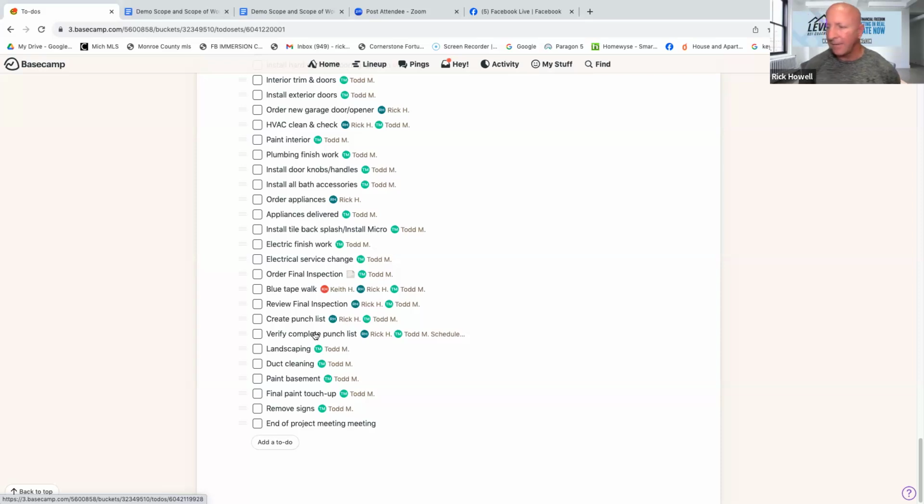Right about that time, in our market, we do our landscaping last. So we do the exterior of everything, but we don't put down the mulch or final cut on the beds or any of that stuff until just before pictures are getting ready to come, because that's when you want it to be sharp. You don't want any overgrowth or anything like that. We do our landscaping right before pictures come. That way it's fresh and clean, the best pictures possible on the market, and sell the property.